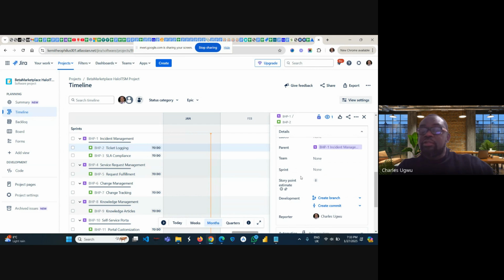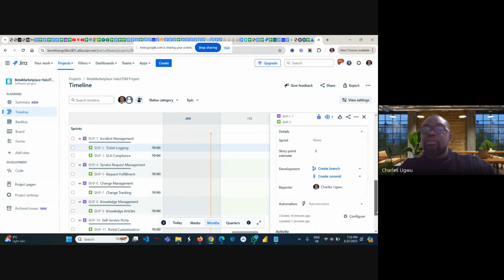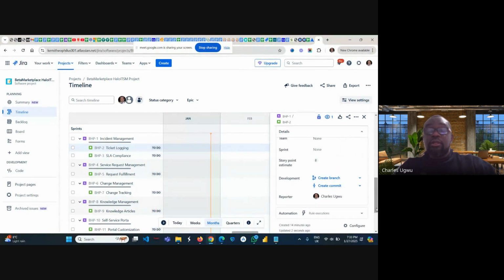Under normal circumstances, when you want to do story points, more especially if you have like 2 or 3 developers, everybody has to vote, and we use the average. So well, an 8 point story is okay. So the story point is the complexity, the amount of work involved in achieving this goal, achieving this user story.